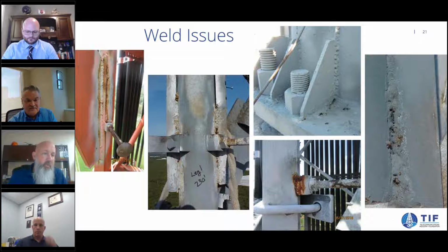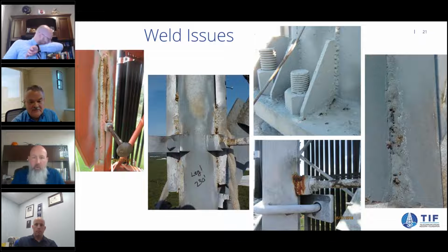Yeah, absolutely, Dave. So the photos that are all on the slide currently, unfortunately, these were all taken during maintenance and condition assessments. And like Justin said, maintenance condition assessments are on cycles. They may be an immediate thing. They could be spaced out 3 to 5 years, depending on the structure type.